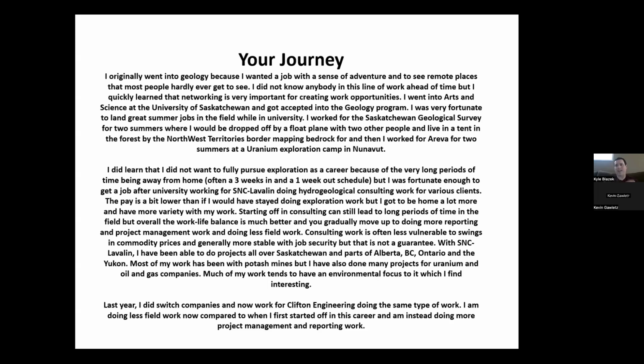That's sometimes how you look at it when you're away in the field and the work isn't too terribly stressful. But sometimes it can be very stressful though. Another thing you have to watch for if you're away doing a work project is scope creep, when suddenly the client wants something done differently, tweaking what it is that you planned that you're doing there. You have to be very careful with that, because that can completely throw off the budget or the length of time it can take to do the work.